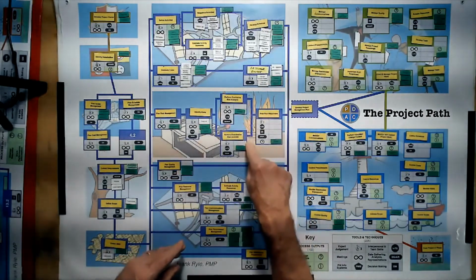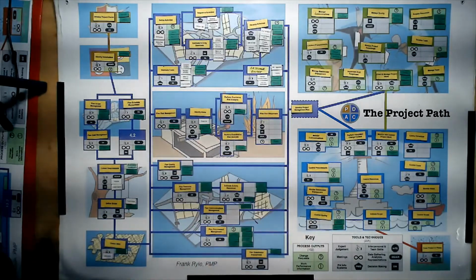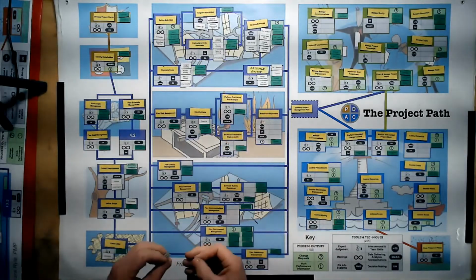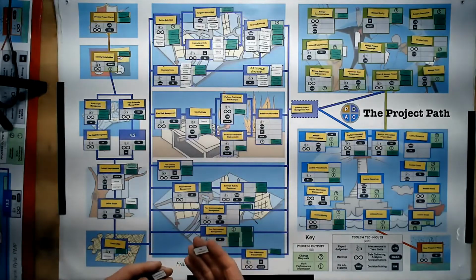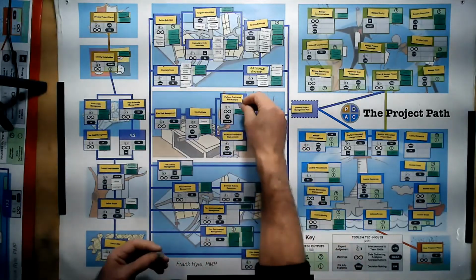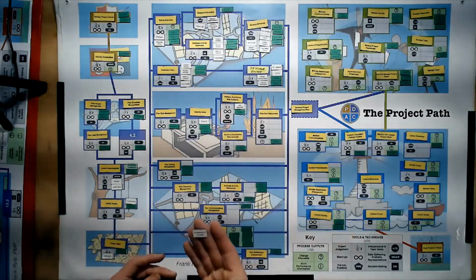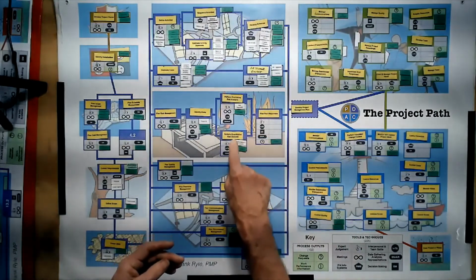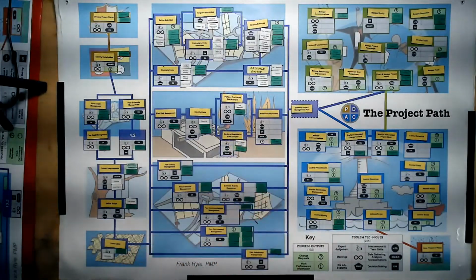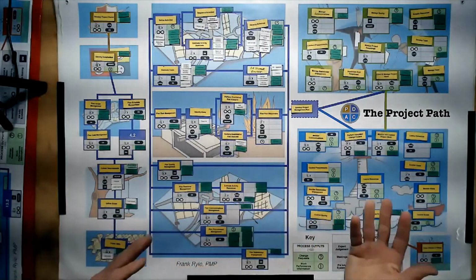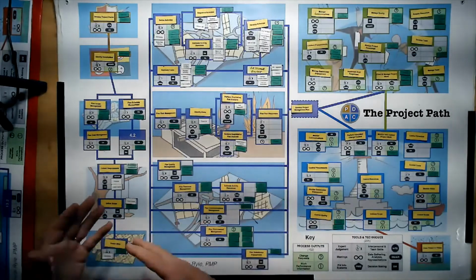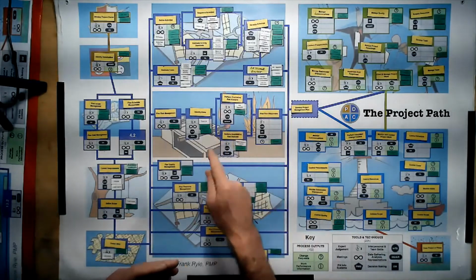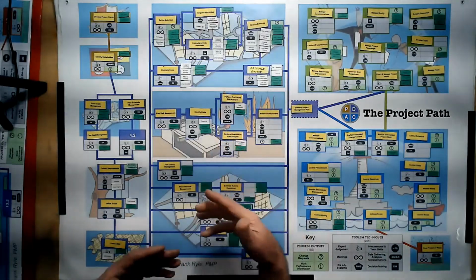Now we have two here in the analysis that are extra, outside of the norms, if you want, outside of the expert judgment and the meetings and those kind of things. But you see the risk categorization is the one that we're going to put into qualitative risk analysis, and representations of uncertainty, which goes into the quantitative risk analysis. And so one of the benefits of doing quantitative risk analysis is that you're getting real numbers. You're doing representations of uncertainty and impact, and you're calculating the impact multiplied by the probability, and you're calculating quantitatively. And I'm not sure why you need the expert judgment there, but I suppose we're saying yes, it is one of the reasons.